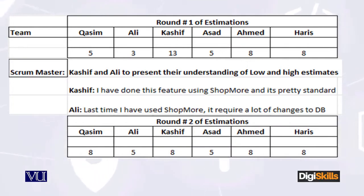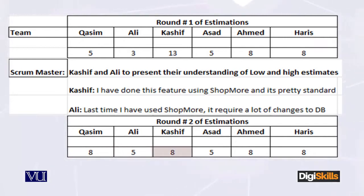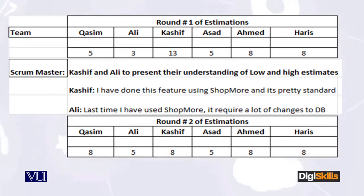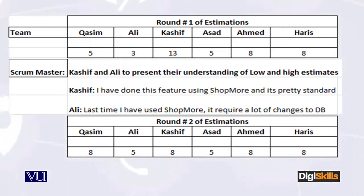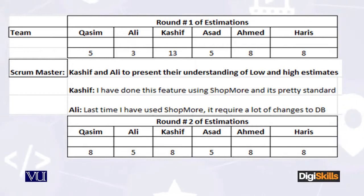Let's do round 2. In the second round of estimations: Kasim gives 8, Ali gives 5, Kashif gives 8, Asad gives 5, Ahmed gives 8, and Haris gives 8. The team is nearly converged. Kashif's estimate came down from 13 to 8. We usually do multiple rounds and arrive at a sort of average.